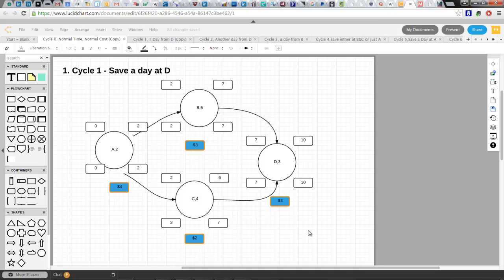And if you remember, we're trying to find the cheapest way to knock a day at a time off. The approach to the problem is to start at 10 days, work backwards, and subtract the cheapest day to buy a shortened process. Every time you shorten by a day, you're looking for the cheapest place to buy that from. When we first look at the numbers, we know A is the most expensive, B is the next, and then C and D come in at the cheapest. They're both $2. And we have to do some analysis to figure out why that is.